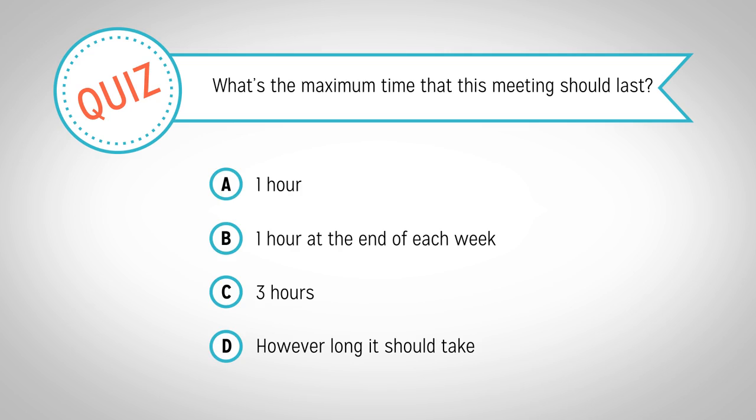You should time box your sprint review meetings to be 1 hour for each week of the sprint. Since your team works in 3-week-long sprints, you should schedule 3 hours for this meeting. Your meeting should not exceed 3 hours. Therefore, C is the correct answer.